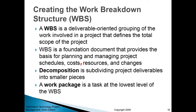Some other important documents are derived from a work breakdown structure. Once you specify all the tasks and specific actions, you can attach those tasks to a timeline — so you have a schedule. You can also put cost estimates to those specific items and think about resources required to accomplish each task. So a number of other important documents are derived from the work breakdown structure.